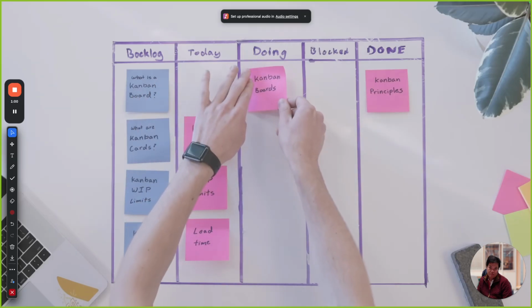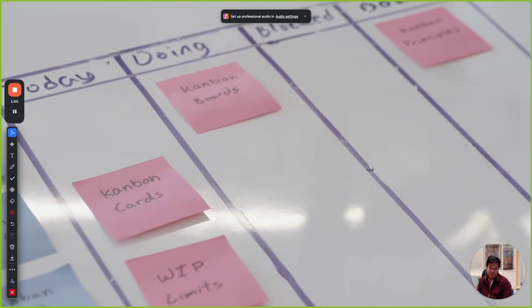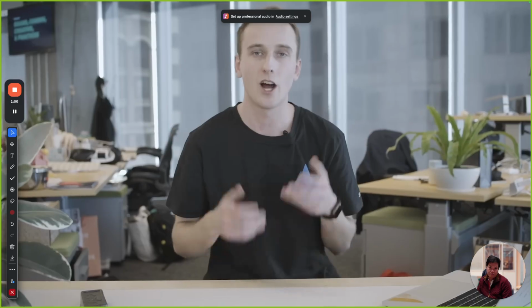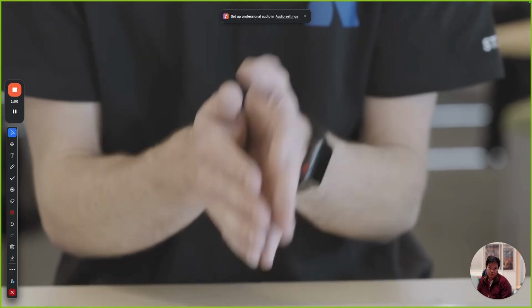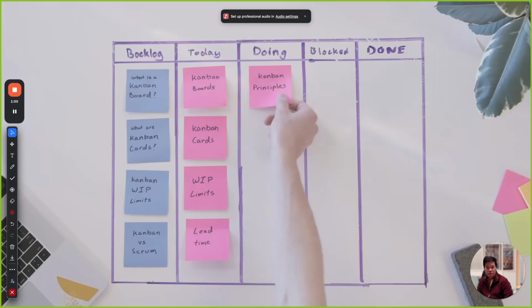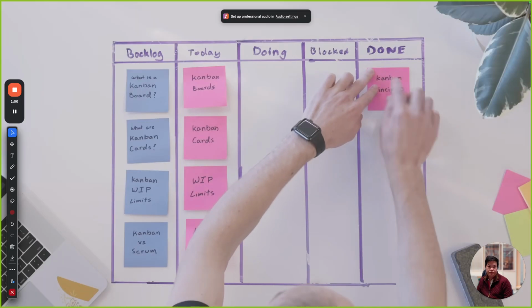Since I have bandwidth now, I'm ready to start my discussion of Kanban boards. Kanban boards like this one can be built on walls, windows, whiteboards, or with a suite of digital tools like Trello and Jira. Their purpose is to categorize all the stages of work that a work item flows through, from something you haven't started to something that's done. This is called a workflow.